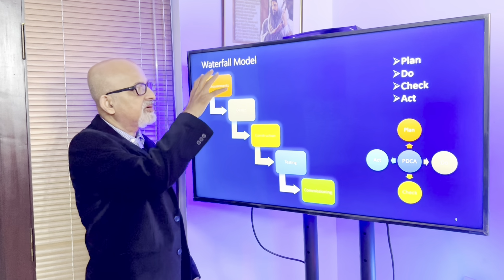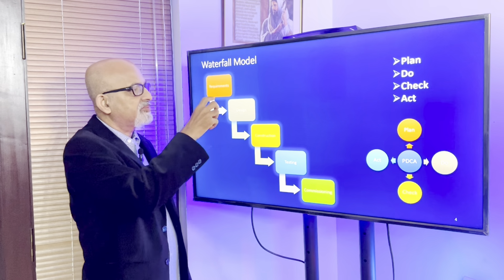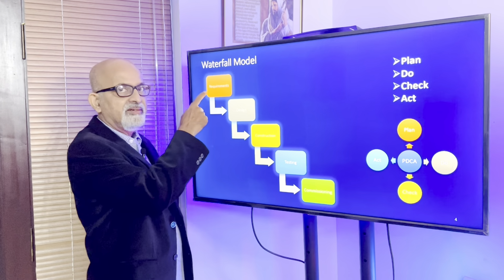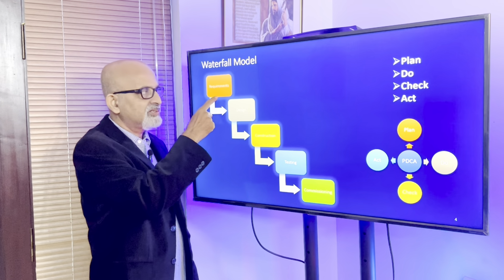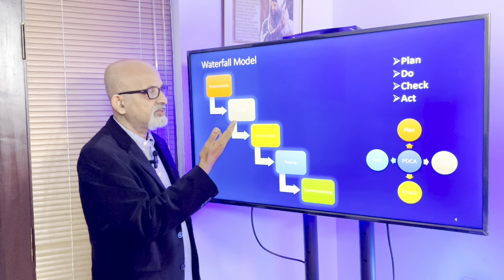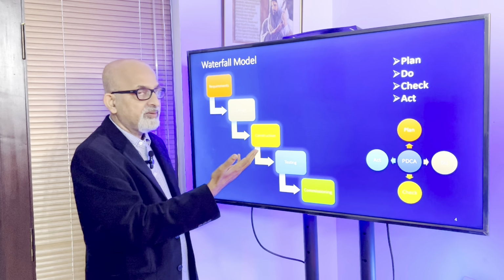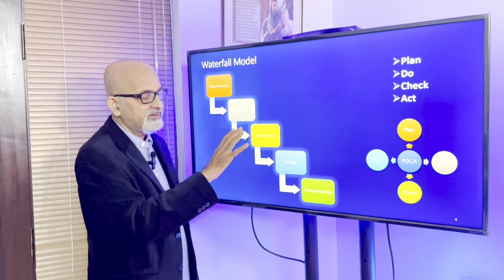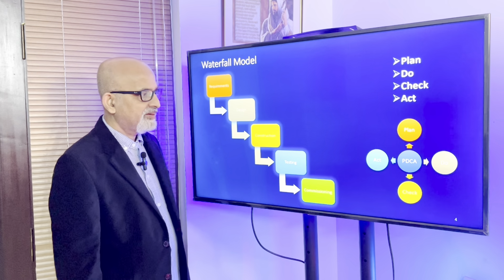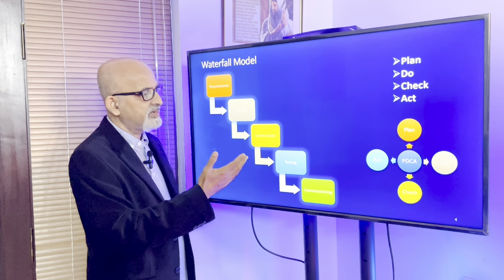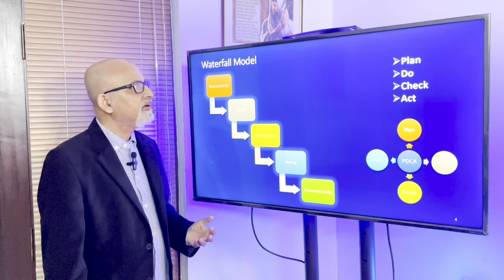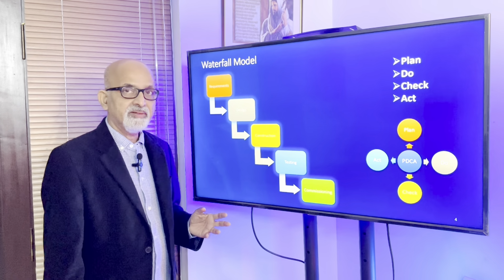Here the problem is, the requirements are frozen and approved here, and when new requirements come in, it will have an impact on the design. So you have to raise a change request and do an impact analysis. A requirements-related defect, if it is closed within the requirements phase, is going to cost you only $1. But if you close it during the design phase, it is going to cost you 10. And during construction, if you are trying to take care of a requirements-related defect, it will be 100 times. The magnitude of the rework increases as we advance in the phases. So it is not okay to keep on changing things if you are following the waterfall model.